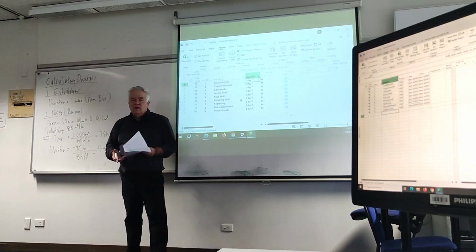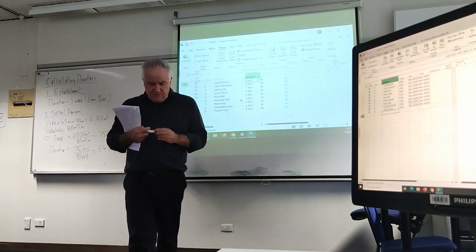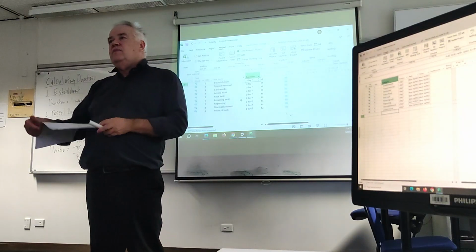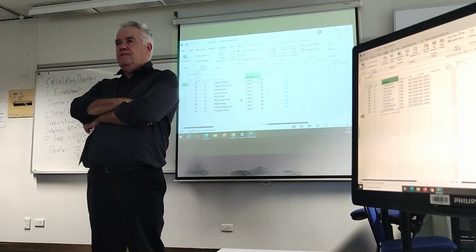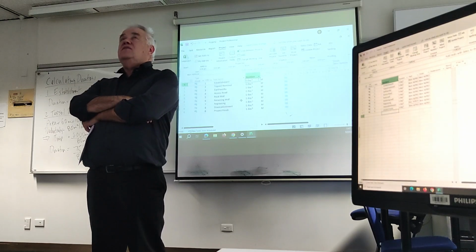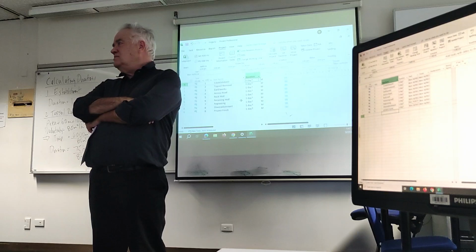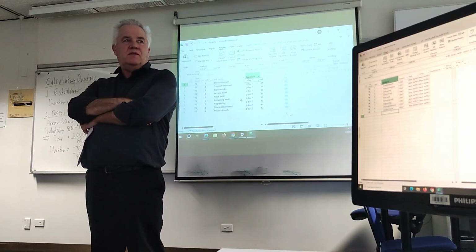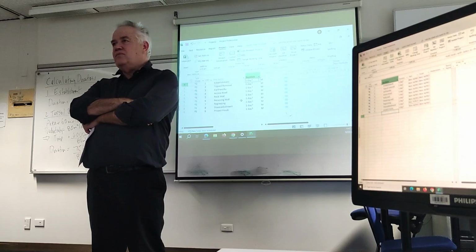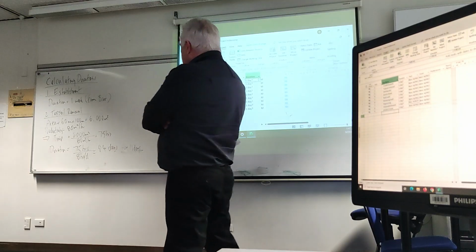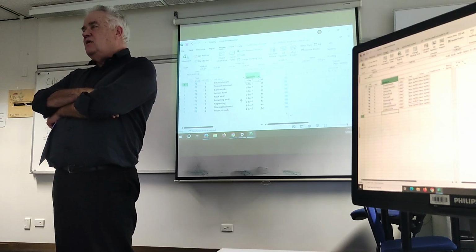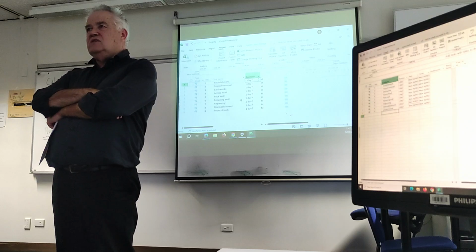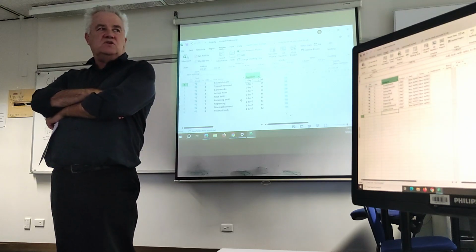Okay, that seems reasonable. Just by the by, if you were doing that in February, would 10 days be sufficient? No. If you were doing it now, would 10 days be sufficient? Why not? Too wet. It's going to rain. So what you might do is look at that and say, 10 days, you know what, we're trying to do it in the middle of winter, dumb idea, we're going to add another 2 days risk. So that's perfectly legitimate, and that's what you do as an engineer.